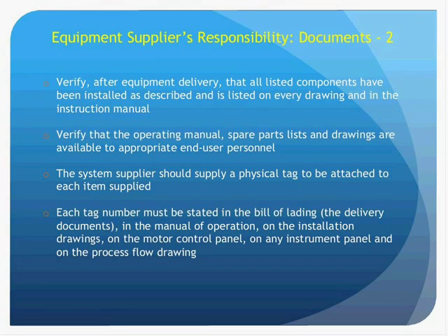The result was the end user was fined for discharging wastewater that contained contaminants at a higher concentration than that allowed. The customer sued the supplier and the installation company. That's a situation that should not occur, and that's why I reemphasize that first item on that slide.